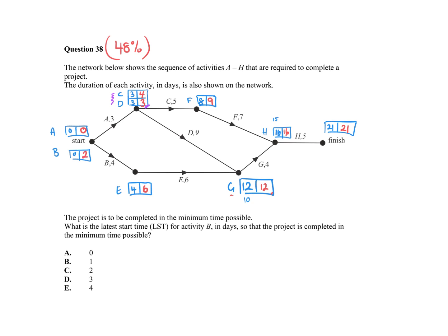So the critical path is the ones where their numbers are the same. So if you look here, we go along there up to D. D's the one with the same number. Then G, then H. So there's the critical path, and you've got all the float times there.